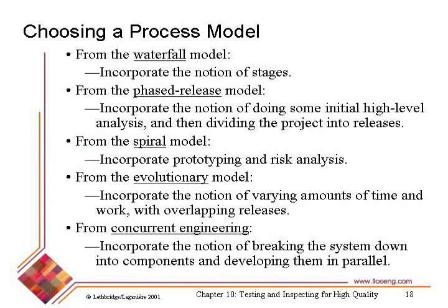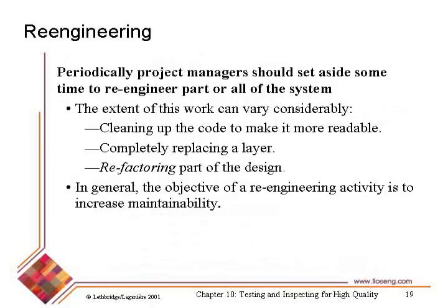Another thing we need to think about as part of our project planning process is re-engineering. Sometimes this needs to be thought about outside of the scope of projects, and it's considered as a separate type of project, where we've had a system that's been in use for a while, and it's undergone a lot of changes. We need to go and fix the design, take part of the design that's proving bad and replace it with a better design.